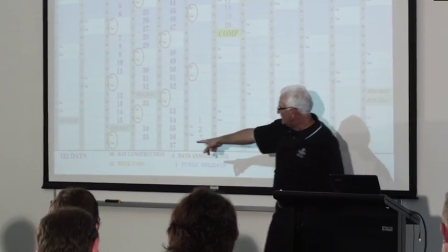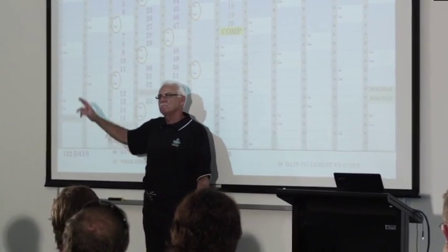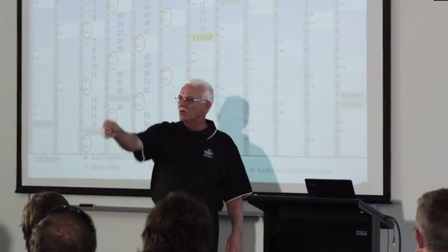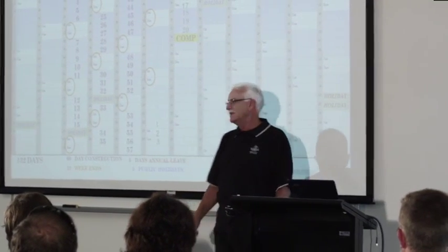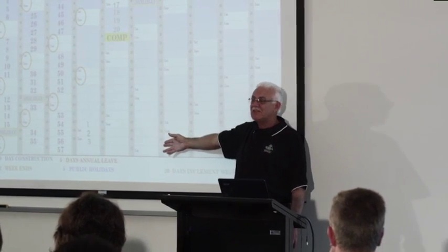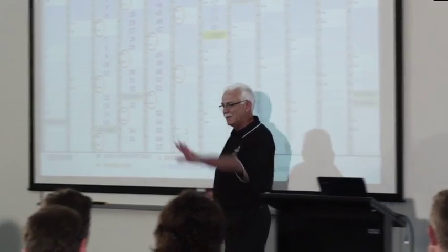But if you've worked out that your 132-day contract is on $50 a day liquidated damages, and your owner wants to have $200 a day in there, it's simple. Just extend your completion date to cover yourself. Because $200 a day is a lot of money.